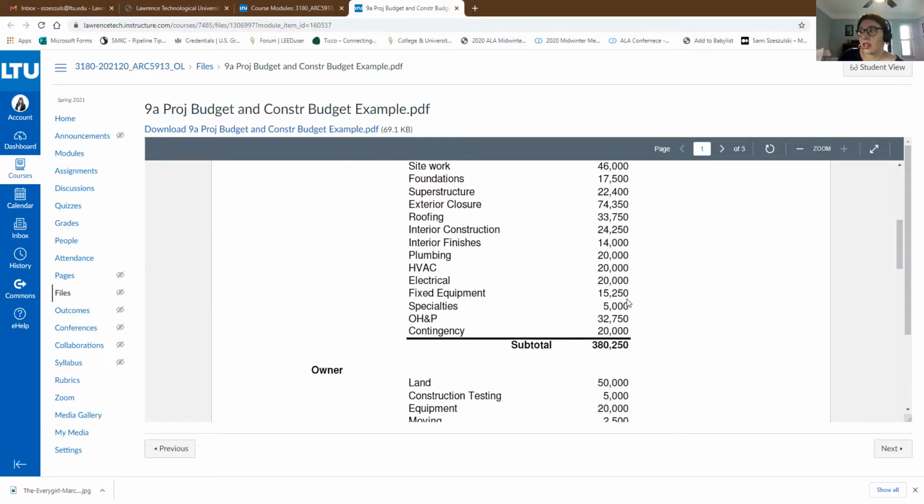Good practice dictates that a contingency be set aside for the unknowns or undefined aspects of a project. This may be sizable in the earliest phases of a project design process, but may be reduced at each design phase until it is zeroed out or close to zero at the completion of the construction documentation, as basically all aspects of the project design have been defined and documented at that point. Depending on the client type, and if a specific budget has been established for the project, you want to ensure that the client is making the most of the money they have and getting the most building they can for the budget they have to work with.